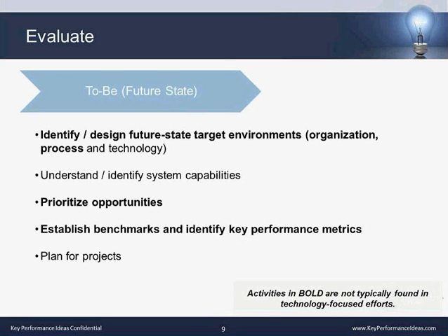And then another piece here that is very often overlooked is, what does success look like? Is success for your organization putting in the technology and saying you completed it, you came in under budget, on time, that was success? Or is it actually having a benchmark you're trying to get to? Reducing cycle time, improving your forecast accuracy, enabling people to be better business partners. How do you measure success? And that's really critical to think about before you start coding anything. Identifying those measures, and as important, what is the benchmark you're going to compare against?